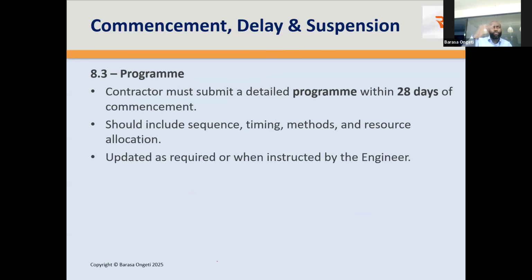Does it have a sequence? What comes after the other? Does it have a timing? When is the start? When is the finish? Does it have the methods? And finally, does it have resource allocation? So when you are having a dispute and you want to say as a contractor, my resources are idle, what are you basing your idle resources on?